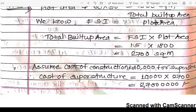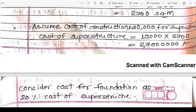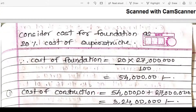Cost of superstructure = 10,000 × 2,700 = rupees 2,70,00,000. Foundation cost is 20% of superstructure = rupees 54,00,000. Always assume 20% for foundation or substructure if not mentioned — this is why a star mark was placed earlier. Total construction cost (superstructure + foundation) = rupees 3,24,00,000.